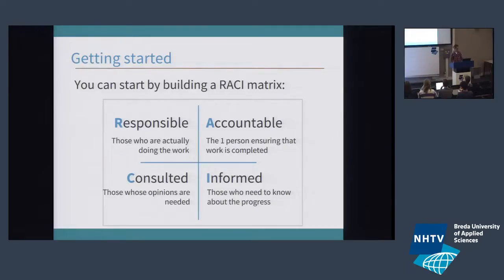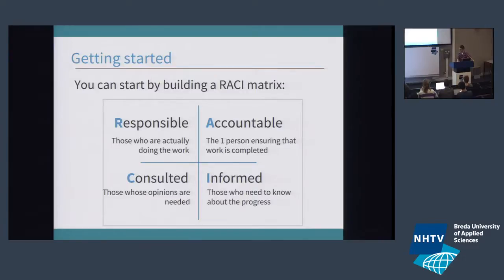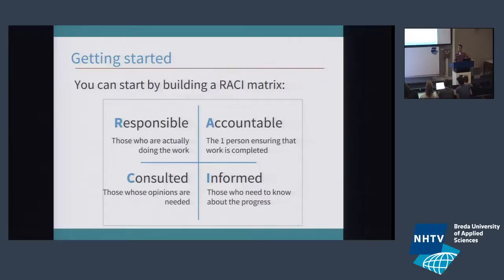The RACI matrix might help you understand the different parties involved and what different levels of communication are. We have people who are responsible — those are the people actually doing the work, such as the developer, artist, or freelancer. But you also have people who are accountable, and this might not be the exact same person — these are the people accountable for something getting done. You have people who need to be consulted — people whose opinions on the outcome really matter. And there are people who just need to be informed on a periodical basis, like upper management, a CIO or CFO.